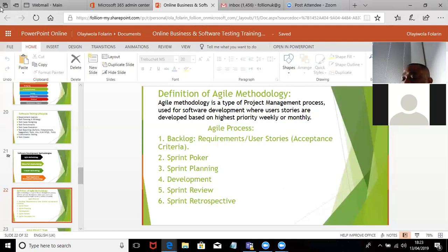Then everybody will close the card. Then when the project manager says, okay, open your card, they will open it. So all the team, developers, designers, product owner, project manager, will begin to look at the different number of days each team member suggested. Now they will ask them why. If they picked the highest, the developer will begin to discuss the reasons why. And at the end of the day, they will agree on the number of days he's going to use to develop the project.